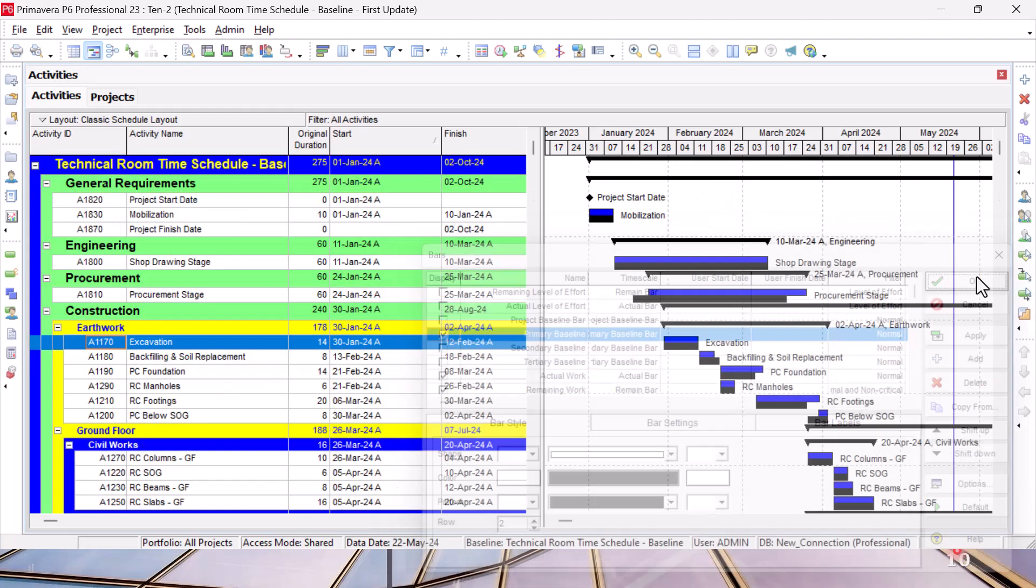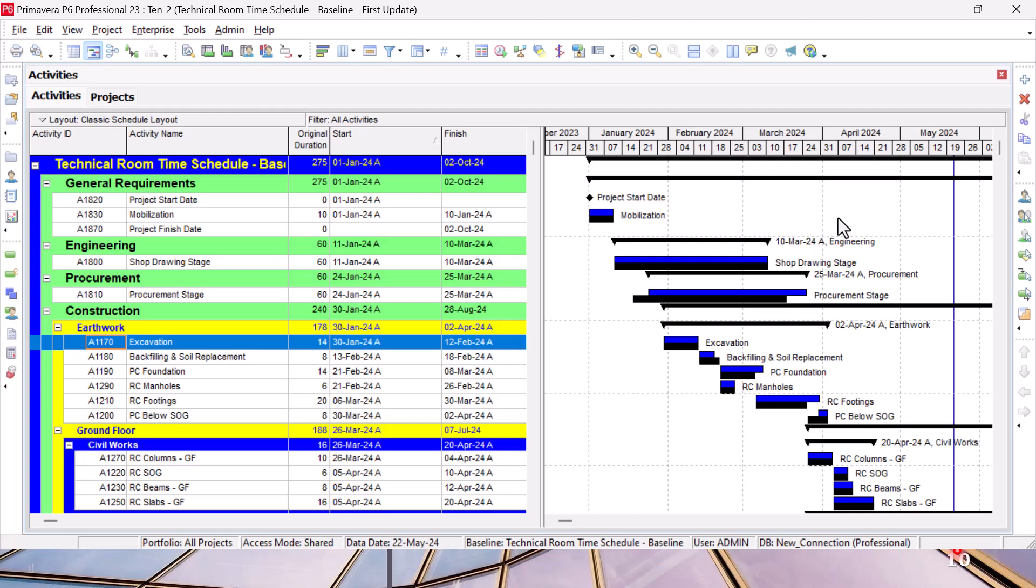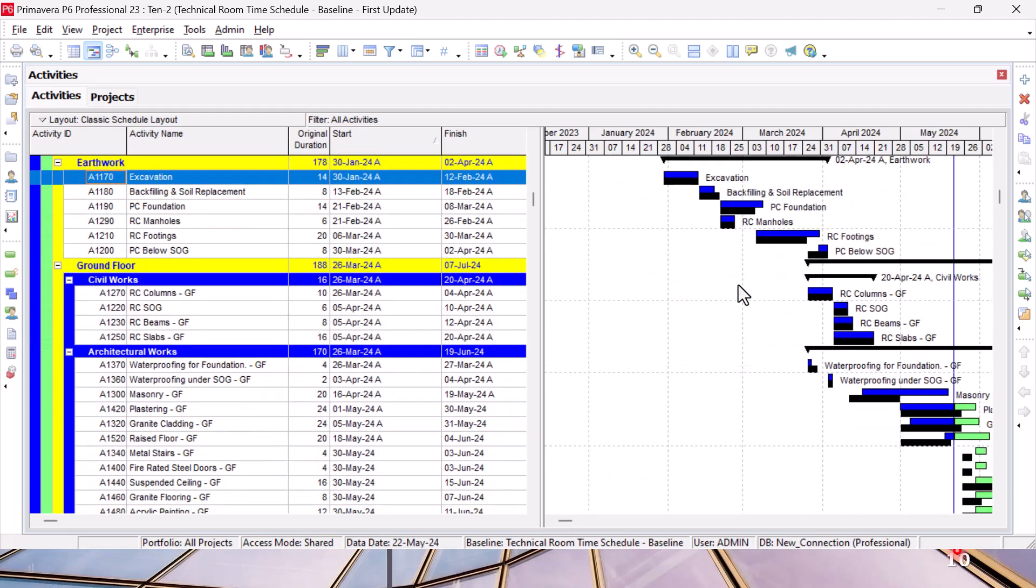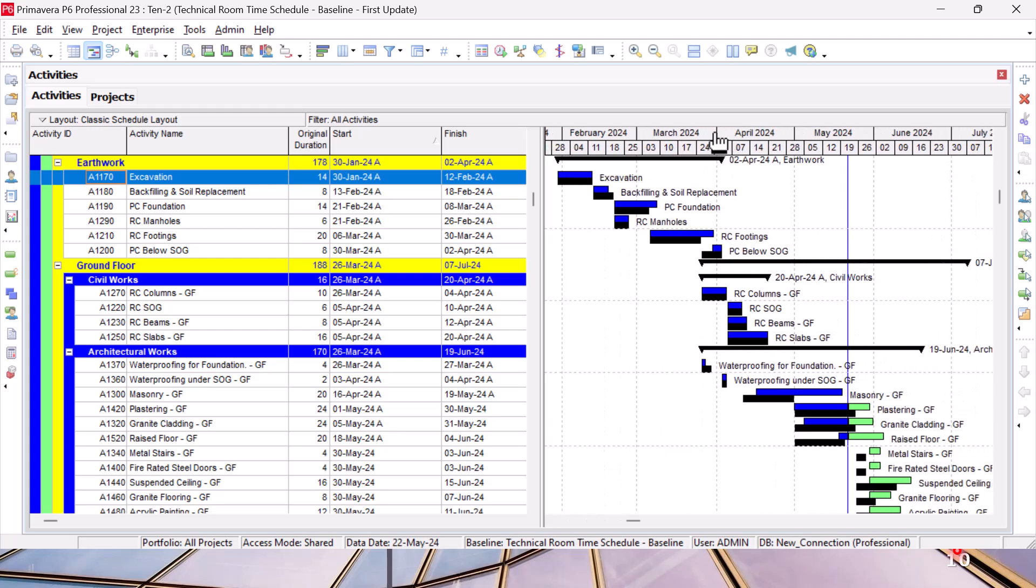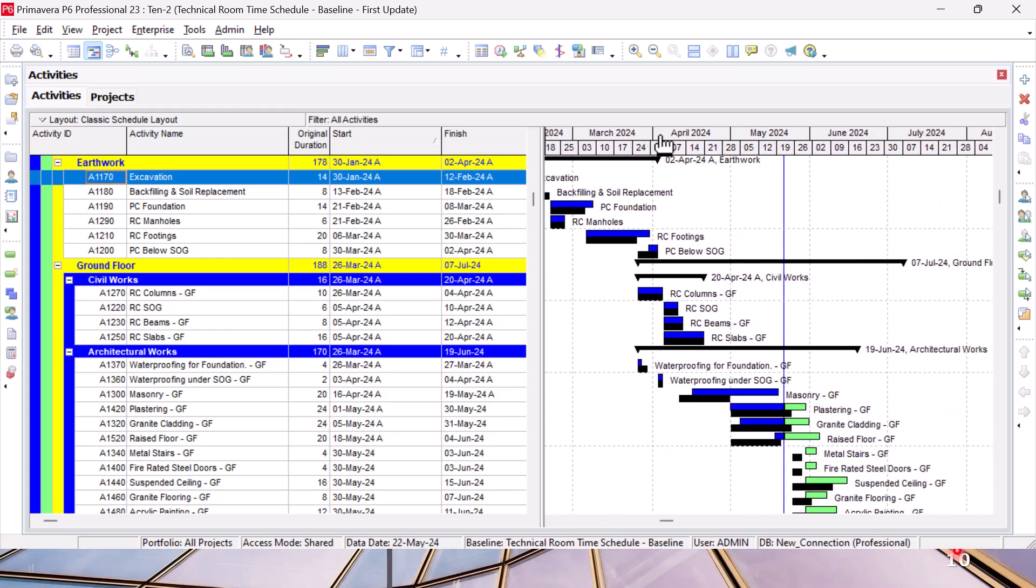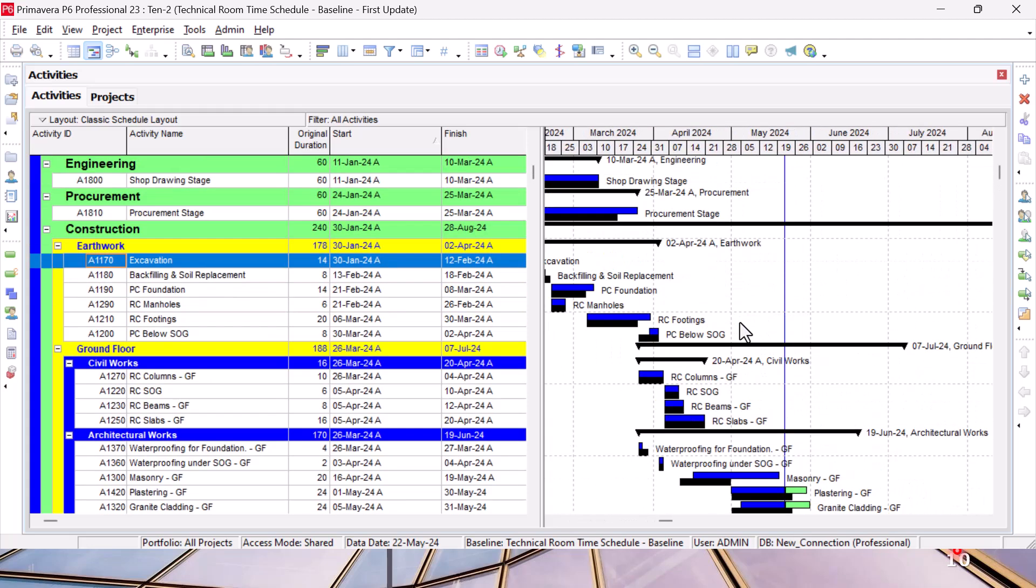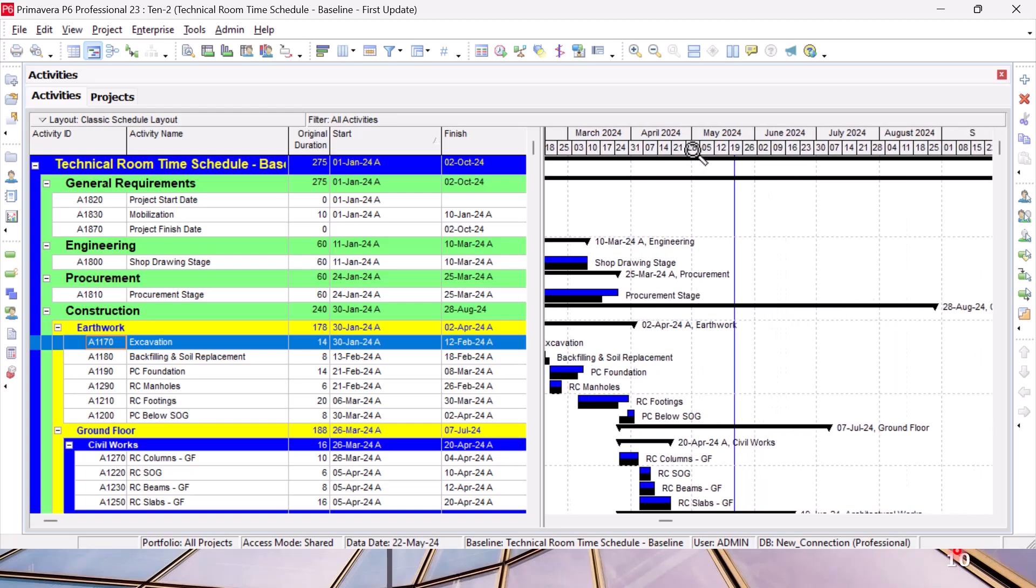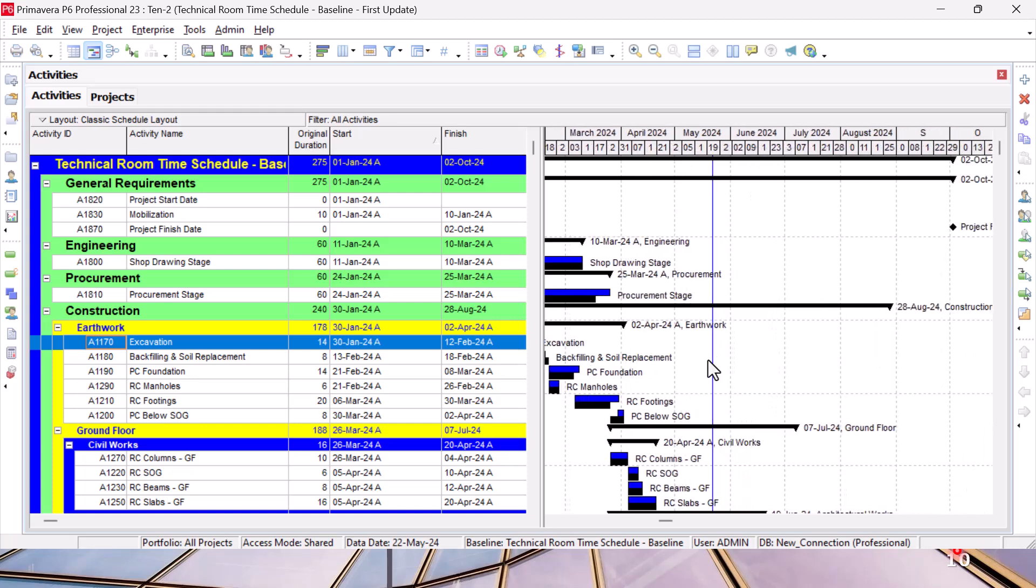As you can see here, now I start seeing the baseline bars in my time schedule. Simply I can see where I am behind, where I am ahead, just from looking at the bar chart.